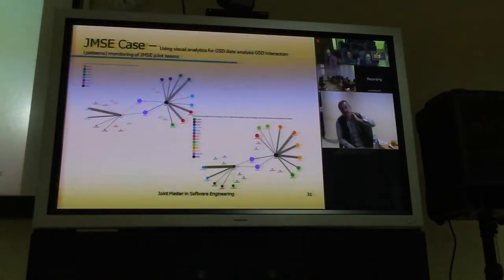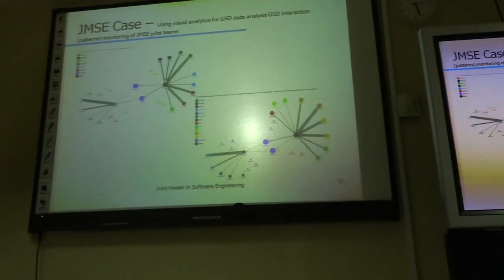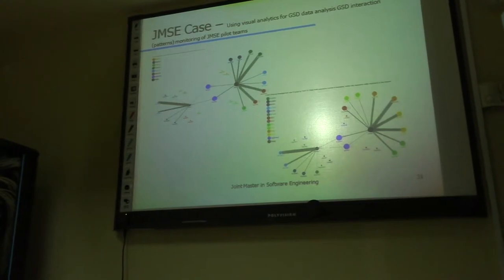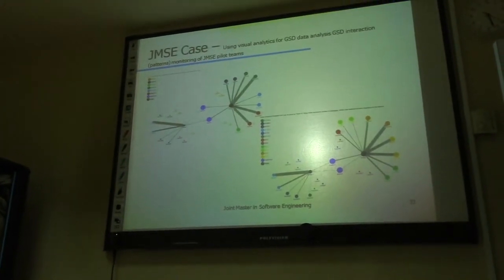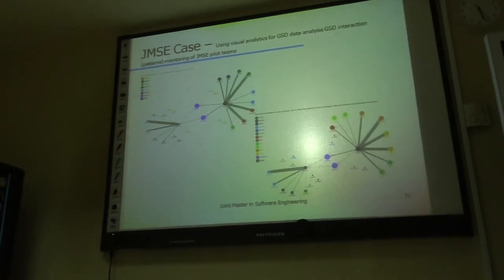That is a collaboration visualization because the thicker the line, the thicker the line, the more communication between these two people. That can mean two things. Either these people had a very important task and they were communicating back and forth. Or secondly, they had a problem and they were trying to clarify it so they were working back and forth.